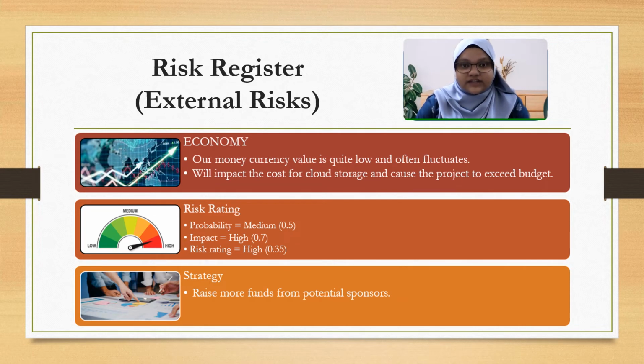The second external risk is the economy. Due to our country's economic situation, our currency value is quite low and frequently fluctuates. It will have an impact on the cost of cloud storage and cause the project to exceed the budget allocated. In addition, it will affect the profit margin for the project.